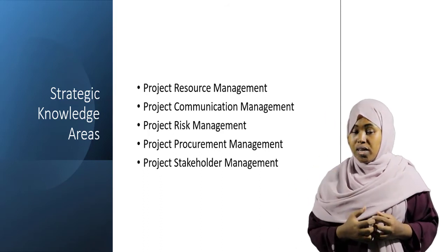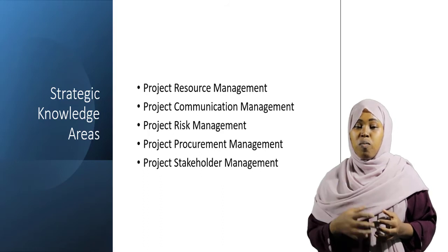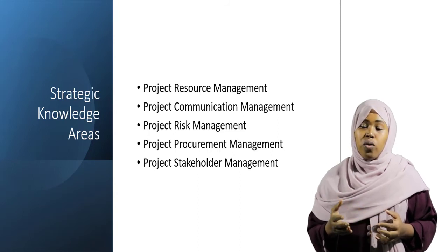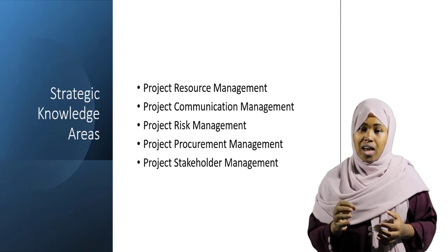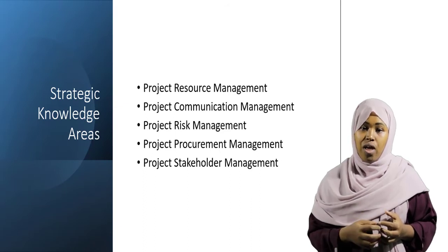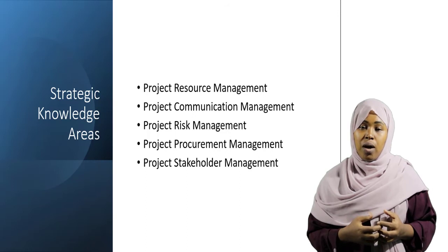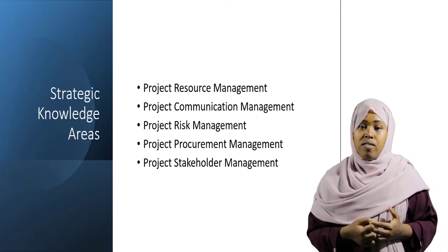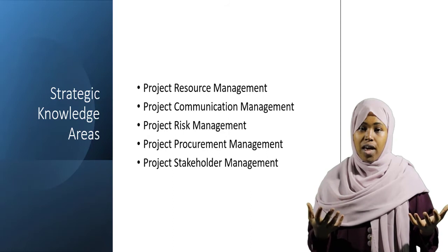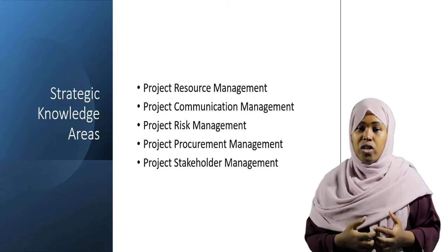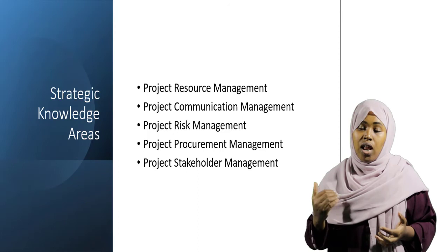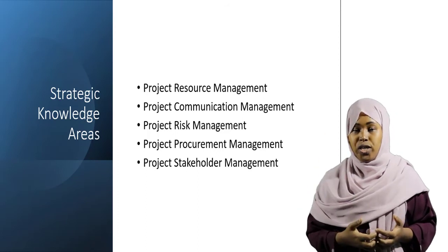In our assignment, the pandemic situation of the coronavirus will affect all these 10 knowledge areas. When you are implementing project management, you have to be careful so that your project implementation is successful and smooth. Otherwise, for example, if the project is in an area with a COVID-19 outbreak, you need a lot of expense for coverage and for masks, and sometimes movement in the area will be restricted. This will delay the project implementation, and all these effects will affect all those 10 areas in your project.